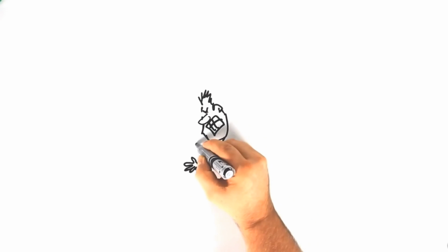Event, because meetings have a negative touch, because they cost time and are badly organized. In the sense of Scrum, events mean that people come together and each event has a time box, which means a maximum time that it is allowed to last.